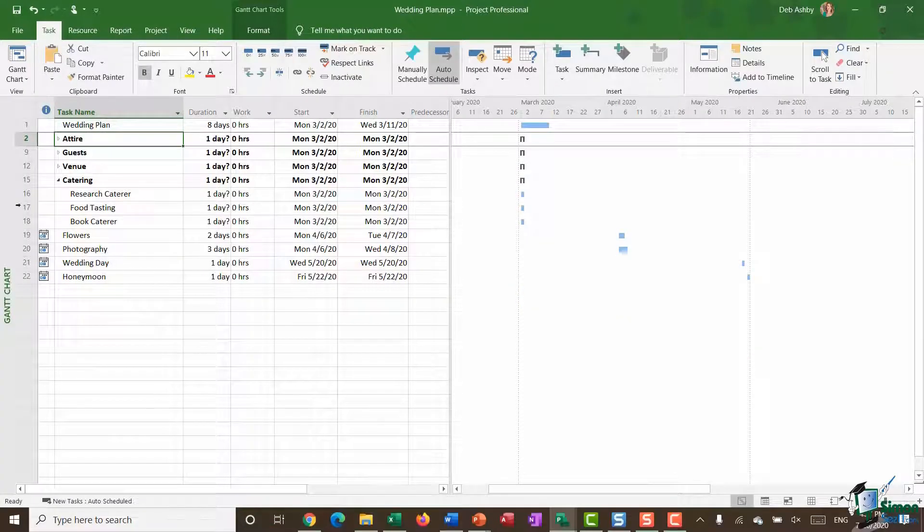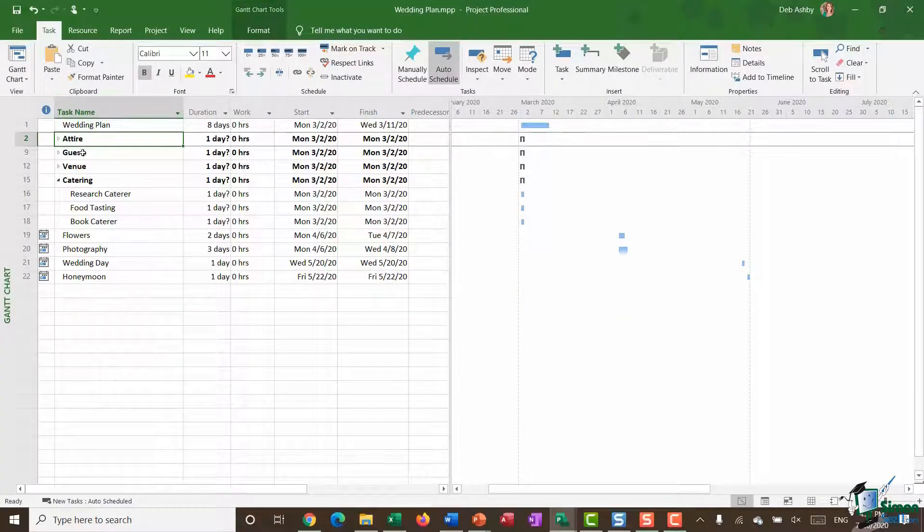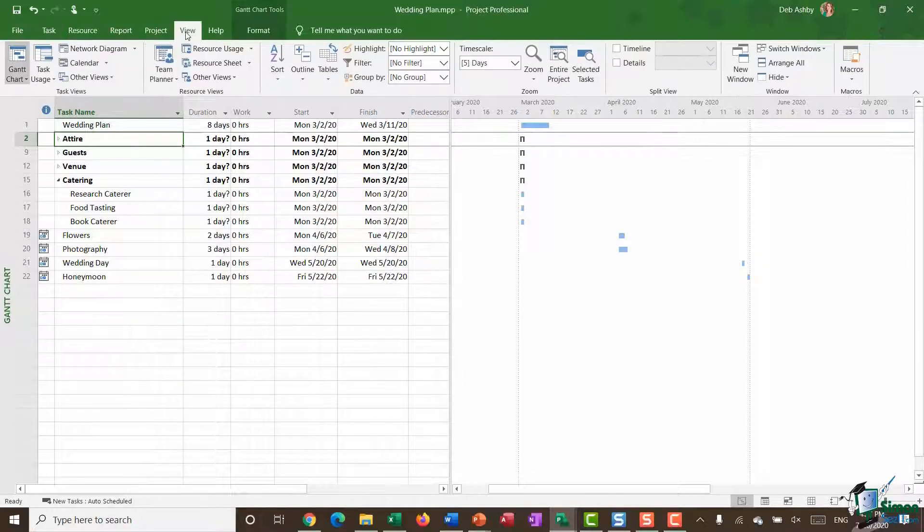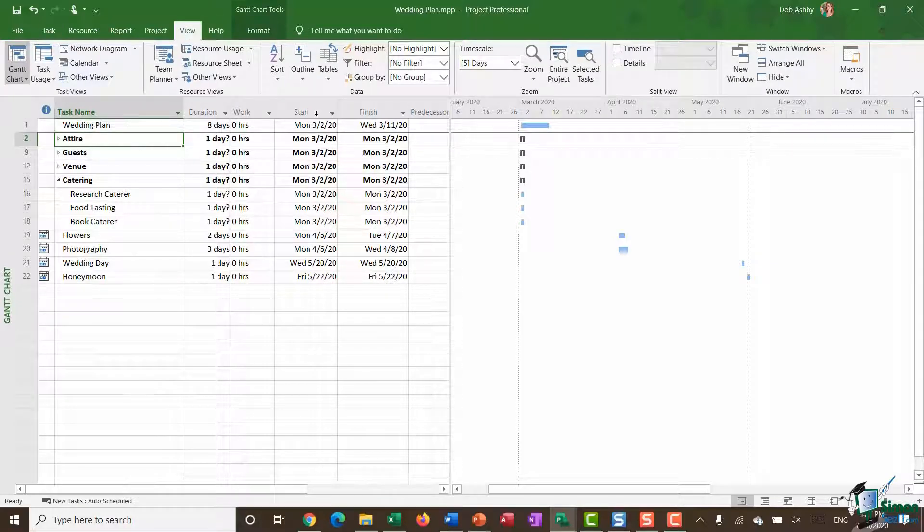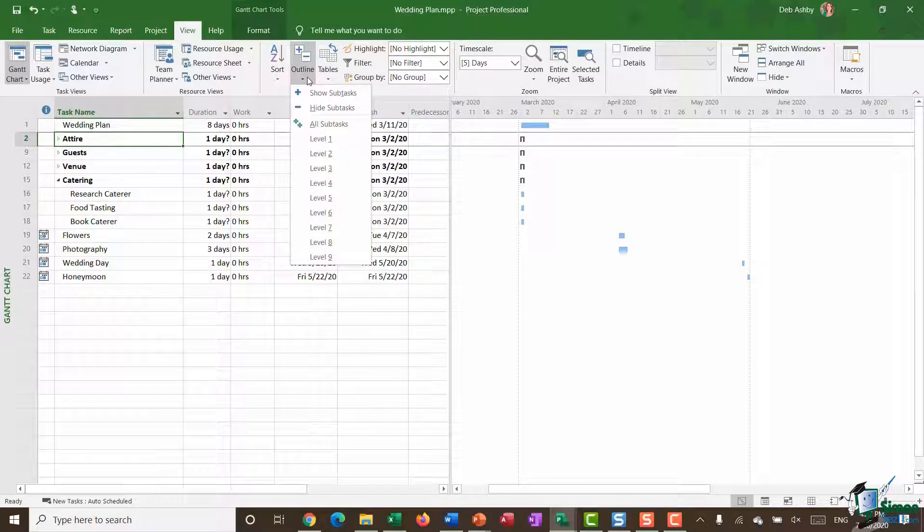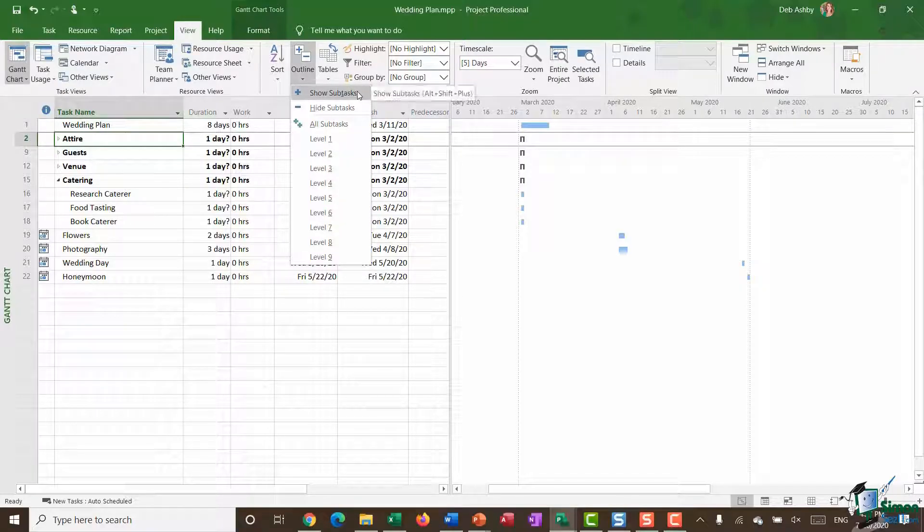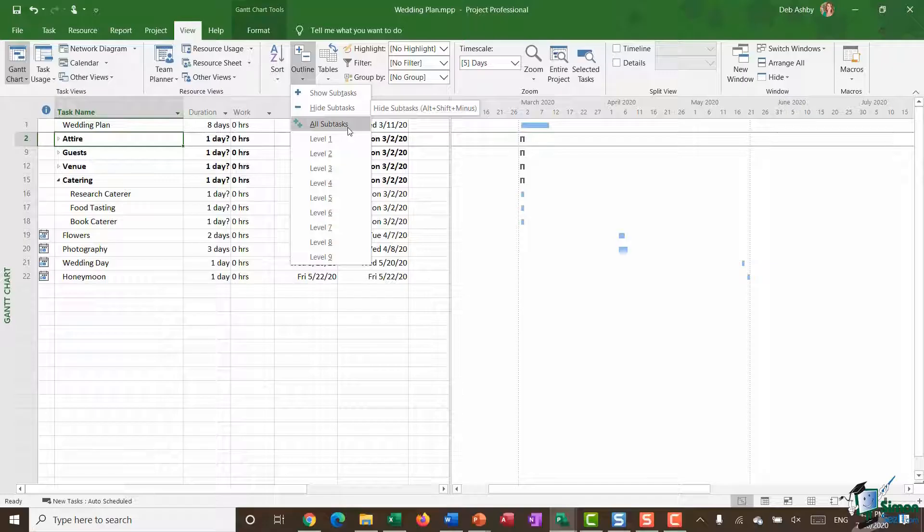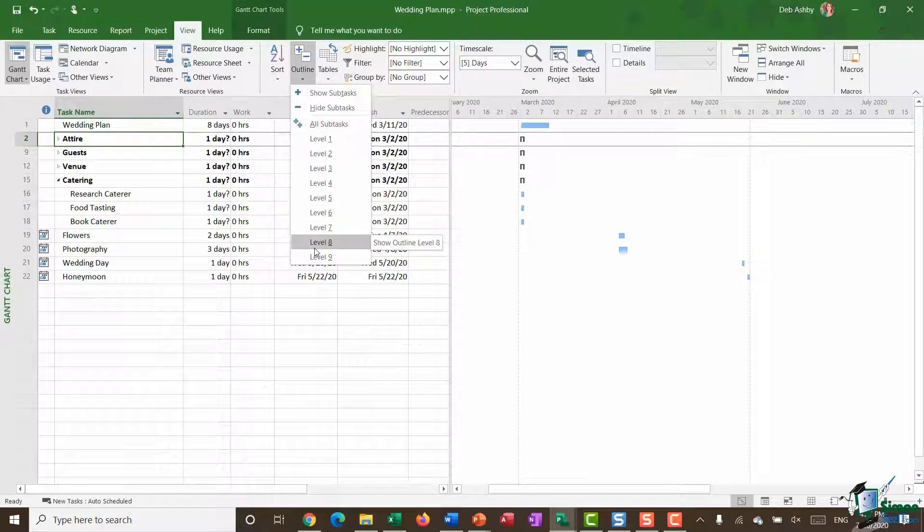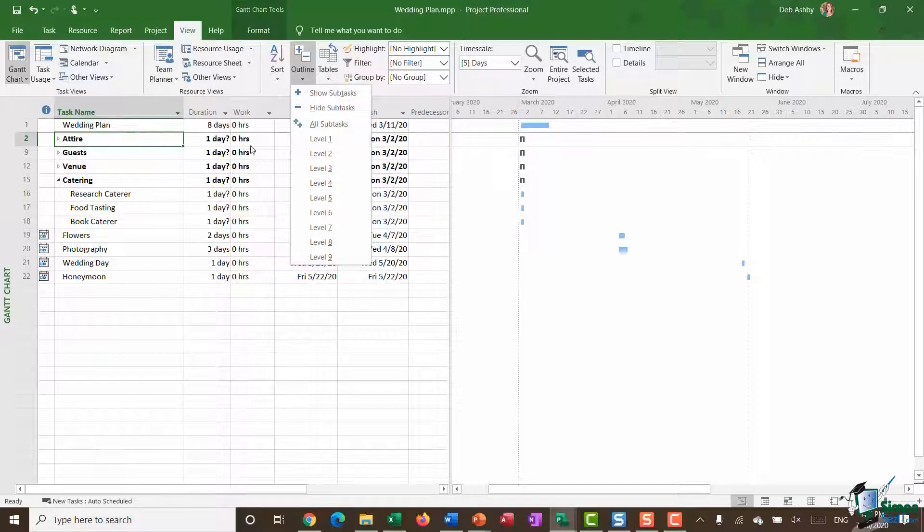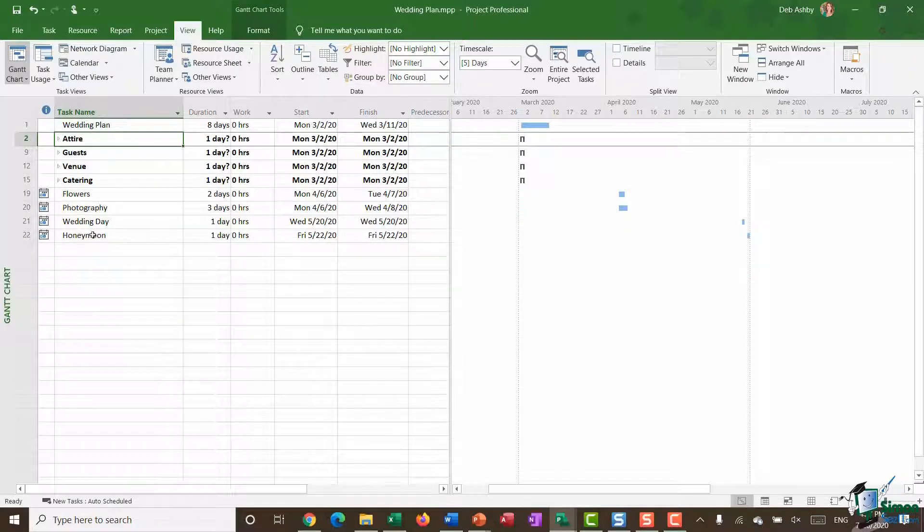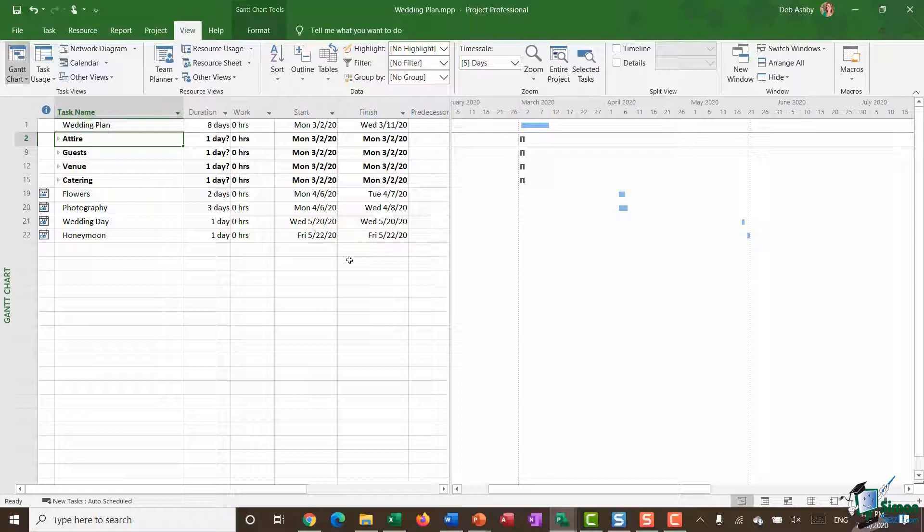Another way of collapsing and expanding everything or managing what you're seeing in your Gantt chart is to jump up to the view ribbon. In the data group you have an outline drop down and this is where you can choose to show all subtasks, hide them all, or see all subtasks and the different levels. So if I was just interested in seeing all the top level headings, level ones, I can click level one and there you go you can see all of those.